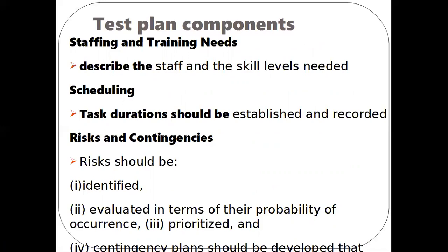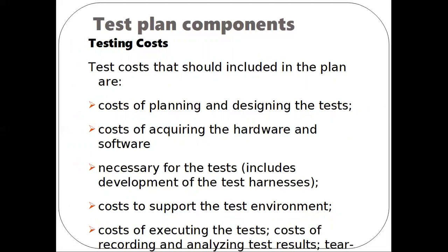The next component is risk and contingencies. Every project has a risk associated with it. The steps to manage risk are: first, identify the risk; second, evaluate the risk in terms of probability; third, prioritize the risk; and finally, develop a contingency plan in case the risk occurs. The next component is testing cost, which is an important factor to be maintained in the project management plan. The project manager, along with the developer and tester, will do cost estimation. Costs include planning and designing tests, acquiring hardware and software, the test harness, supporting the environment, and executing, recording, and analyzing the tests.